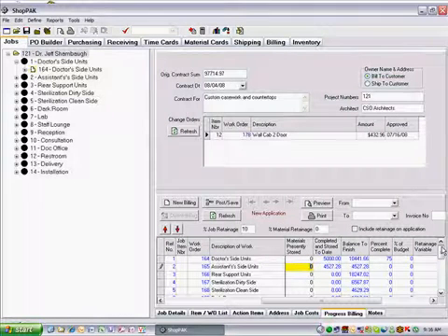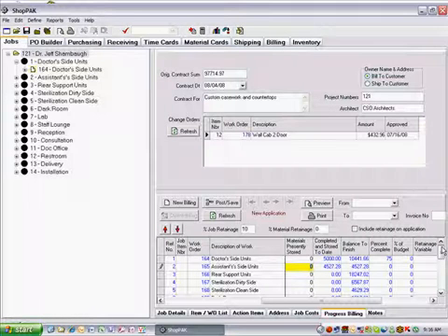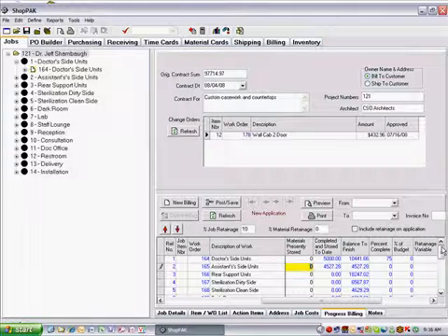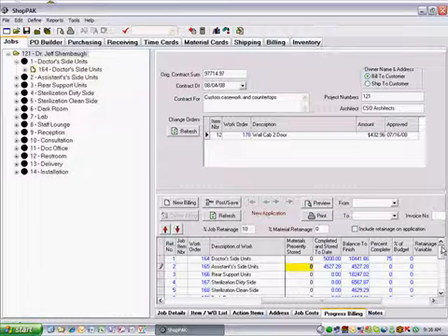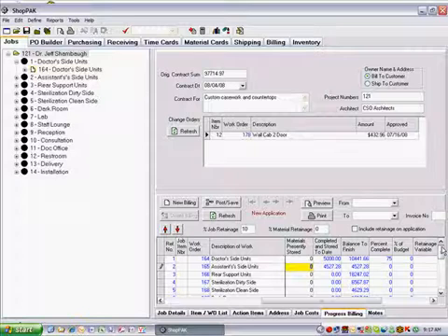However, due to the fact that you are projecting a relative completion percentage, and there may be issues with collecting payment from the GC, you'll often enter % billed percentages that are greater than either of ShopPAK's progress tracking percentages. Another handy feature is you can edit the application item description without affecting the corresponding work order or job item description in the job tree.